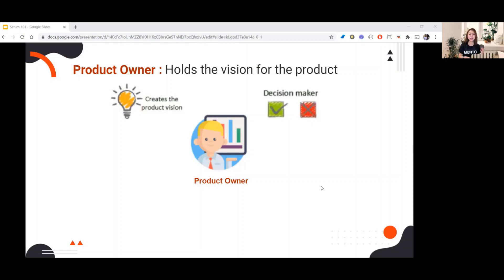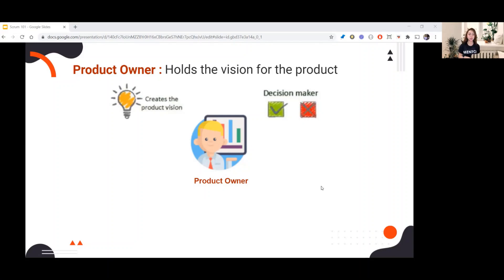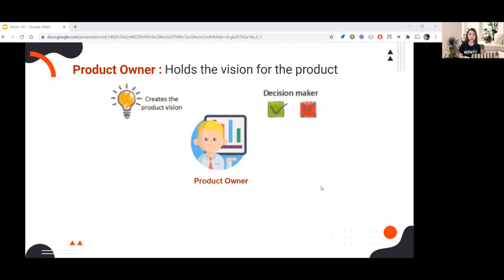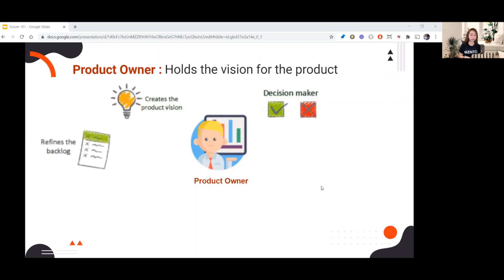In Agile, there are many sudden changes, even during the sprint. When priority changes, the PO should decide right away what to trade off, trading off user stories. And then refines the backlog.